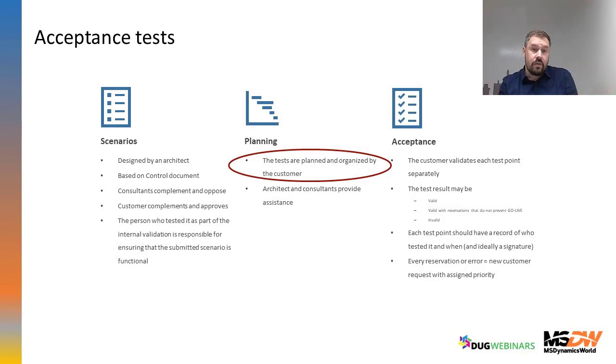So just now you gave the customer these tools, which are customized to help them in their business process, and they should validate that their scenarios are fulfilled and that everything is okay. And these scenarios should be designed by an architect, the solution architect, because he is the person who knows about customers' processes, but who also knows details about the technical infrastructure and technical design. So he should be the first who will write these scenarios.